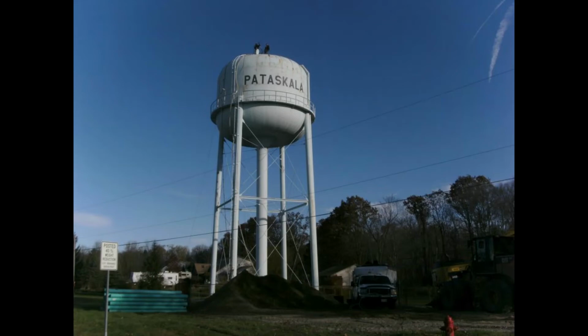We like somewhere around 8% for inspection, but I think it's worth pointing out that the reason we got a $360,000 construction bid is because it was low and they've already mobilized. So I still feel like we're in that 8% window. We have worked with Verdantis before for inspection at the wastewater plant. They did a pretty good job for us there. Since it is below 50, we used the citywide RFQ that we put out at the beginning of this year to select the firms and ranked them, and then got this proposal from Verdantis.